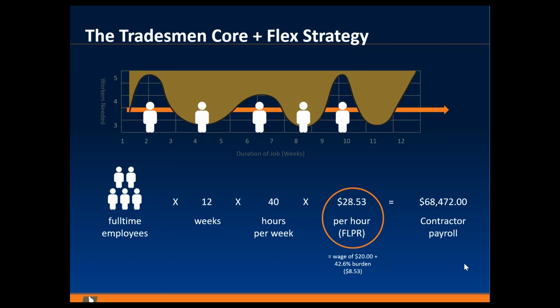So this is a business that does probably 1.5 to 2 million a year in annual sales. So again, you can scale your business against this, or possibly better, maybe at the end of this webinar, you'll give us a call and we can come out and actually fit a job cost analysis to your annual business or labor cycle. So let's just walk through this together. Again, in a cost plus bid situation, we'd be looking as a contractor at parting out the cost of labor, parting out the cost of material, adding in whatever profit, usually between 7 and 15%, depending on the size of the project. And then we'd have to show that to the GC, CM, or owner, and obviously hope to win the award.